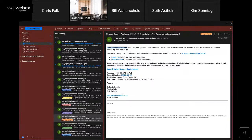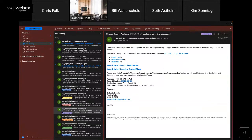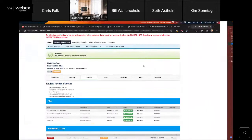Once all the necessary reviews for the resubmittal review are completed, that cycle will come to an end, and then you'll get notified via email that the cycle is complete. And at that point, a new review package has been created for you. So the portal, in essence, has been opened back up for you to be able to complete your resubmittal along with the responses to the issues, and you can resubmit for a third cycle. So you'll go in that back and forth with the team and collaborate on getting those issues resolved until we get to plan approval.